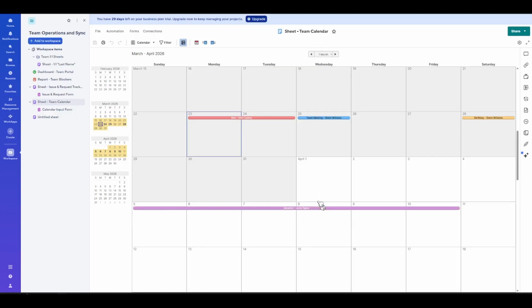and overlaps. If your calendar looks empty, or you're seeing fewer items than expected, that's usually a sign that your rows are missing dates or that the date columns aren't formatted as dates. Make sure your sheet uses real date type columns and that the tasks you want to appear include a valid date range, or at least one date. Also, remember that the calendar typically displays the row's primary details, so clear, concise task names make the calendar easier